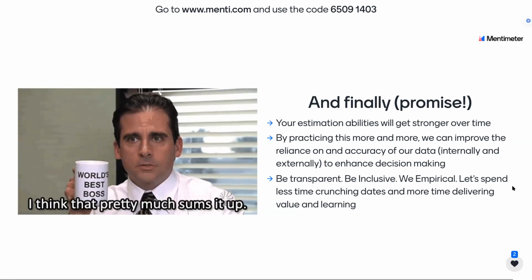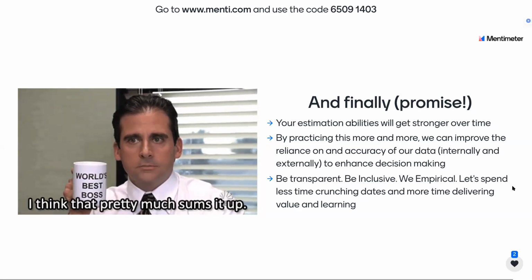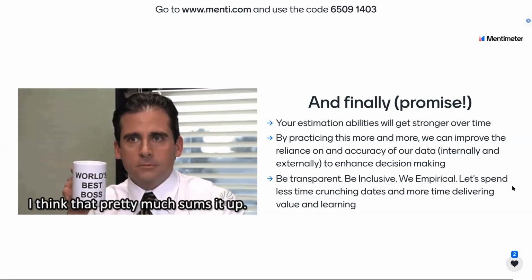And then Richard, you just asked a question, how do we know that the same matrix is applied for assessing story points across squads? The key thing is that your squad with SAS will be different to Phoenix. It'll be different to Scientific Art. These are guiding principles on how to develop this, but only you and your team can come up with your own matrix. Again, we're leaning in on the core categories there about what drives size, and that's looking at the research and stuff like that. And that's, you know, complexity, risk, and effort.